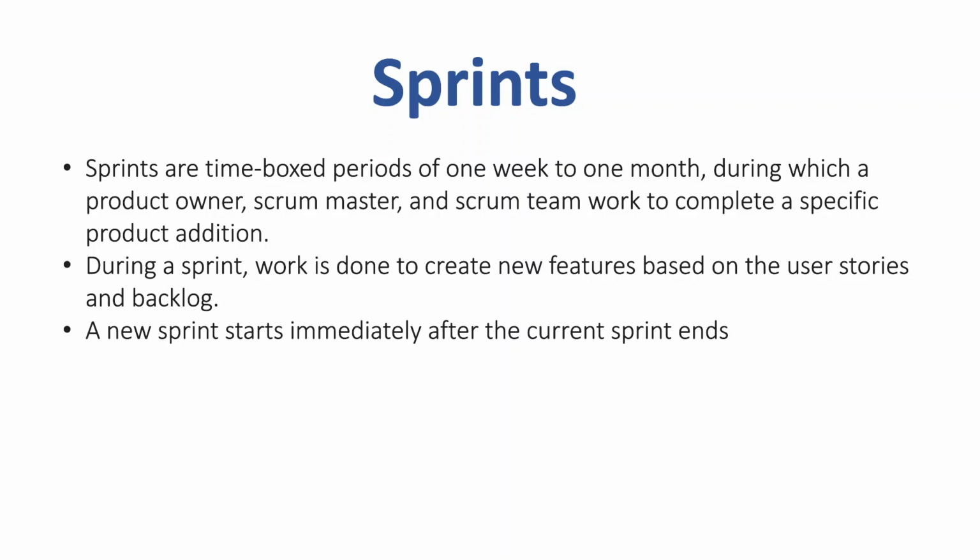Say you are working in a development team. You will try to understand the user stories and pull them in from the backlog into your sprint, and you will estimate those user stories based on your team's capacity, and you will start working on it, and try to achieve that sprint goal within the specific time that is provided for your team. That is what you generally do in a sprint planning session. You estimate the work and you have a sprint goal defined.